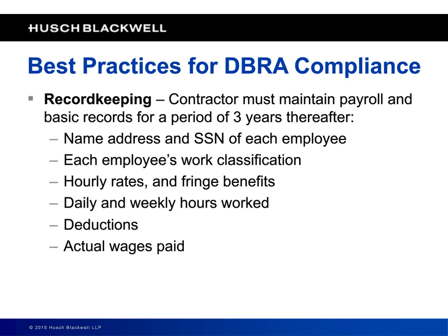And again, that Wage and Hour form 347 has all these items of information: the name and the address and the hours worked and the class and the deductions and all that. That's all on that form, and it needs to be filled out completely. So that record itself is one of the things that you have to keep.